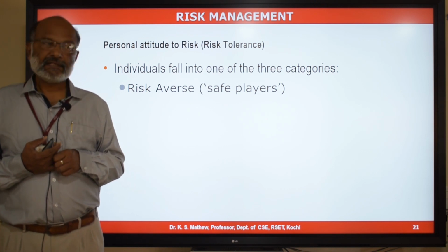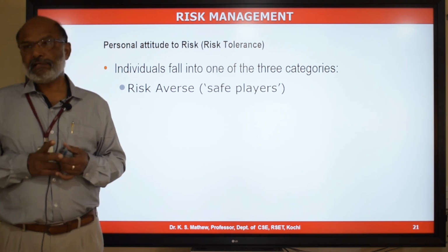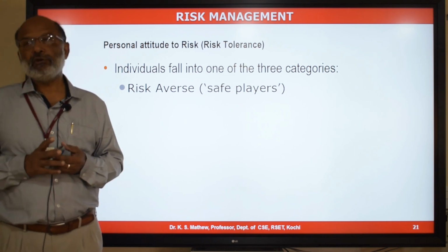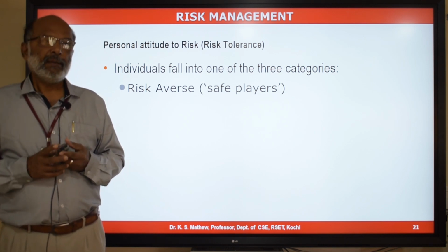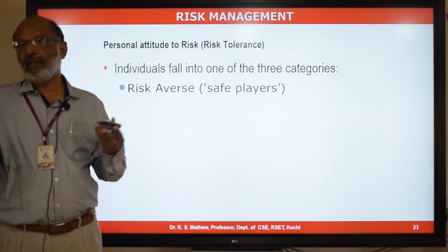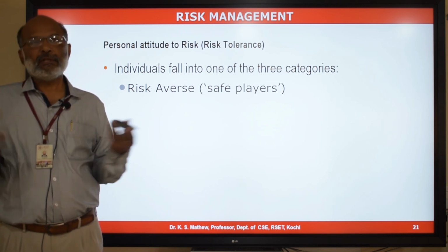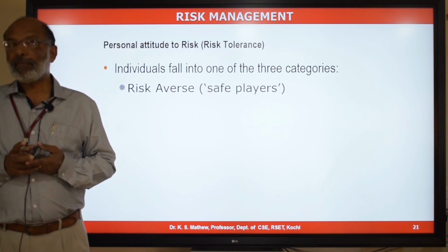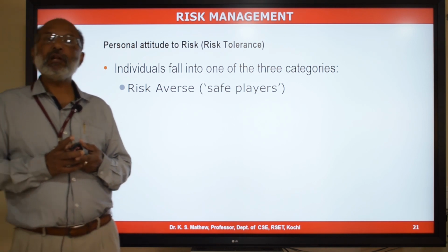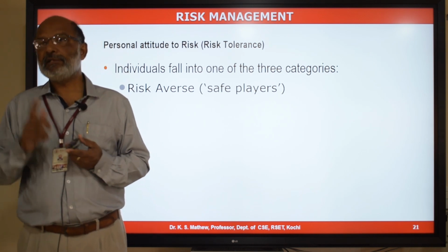So a risk which may have a schedule impact in your project, for the organization there will be a control limit for the schedule variance, like plus or minus 5%. That indicates if you can complete the project within a variance of plus or minus 5%, not more than that, your project will be considered as on schedule, right? But for a customer, that variance may not be tolerable. You may not even tolerate a 1 day slippage in the project.